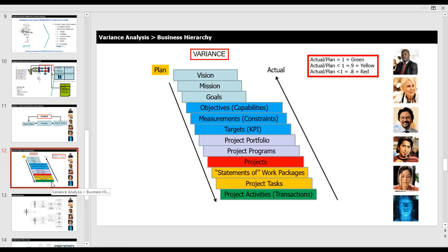And the idea is that every time you iterate through your cycle of planning and you reuse historical plans over and over and over again, you develop a better estimating process. Ultimately, what I like to call is parametric estimating, which is where you've got a lot of historical data in a database. Oh, data, business data analytics. Yes, we use historical data to predict future outcomes. And this is where it all begins, right here on this variance chart.